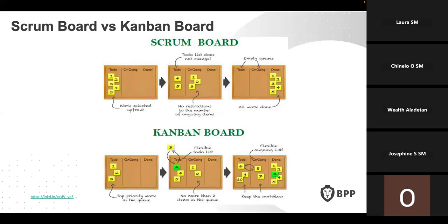Yeah. The flexibility within Scrum is within the sprint. Remember, your sprint is 2 weeks, right? Yes. So within the 2 weeks time frame, you're not adding anything new. When you wrap up the 2 weeks and you notice there are some tasks that you are unable to complete, those tasks can go back to the to-do list for the next sprint.